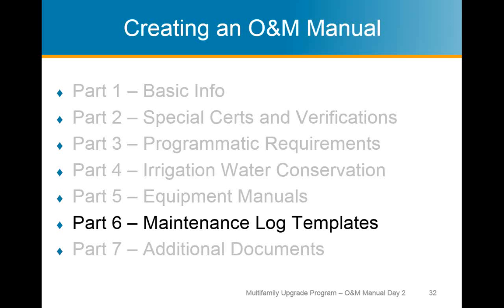So I wasn't quite sure if the end of the question was should we warranty it independently outside of the manufacturer's warranty. But if the question was just documenting the default manufacturer's warranty on the individual systems, right now the advice I would have to give is err on the side of over documentation and logging it all in the manual. But the practical advice is address it on a case-by-case basis. If something is so minor in terms of replacement cost that it's basically going to take you more time to document it in great detail than it would be putting that time elsewhere, then obviously it's something that can be a judgment call. Okay, thanks. That's all we had.